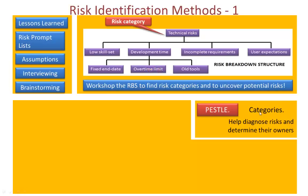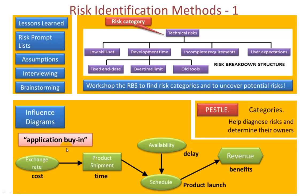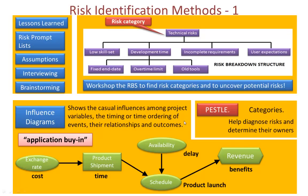I've mentioned PESTLE already — these categories help diagnose risks and determine their owners. Suppose your project had to buy in an application from a third party. You simply create a diagram like this. Imagine if the third party was in a different country: the exchange rate may escalate costs; product shipment time might cause delays to the schedule; availability — off the shelf or custom-made — could cause extra delays. Delays to the schedule could delay the product launch and affect revenue, and hence the realisation of benefits within given timeframes, which would have a direct impact on the business case. These show the causal influences among project variables, the timing or ordering of events, their relationships and outcomes.